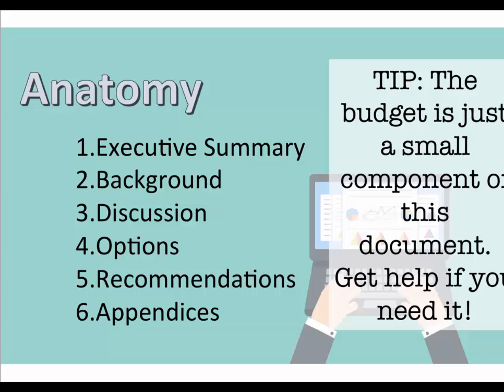Perhaps the charging issue, whether you charge the patient, formulates part of your option 2, your fallback position. You tweak the things and the people that you need to deliver the gold standard, and the bronze standard is the section 2. So perhaps you take out the frequency or the number of programs you deliver, or you charge the patient, or you tweak option 2 to make it a more financially viable offer for the decision makers that are reading it. It's simply a matter of whacking in a spreadsheet and attaching it to the back of the business case, and that's all the financial elements that are required in this business case.